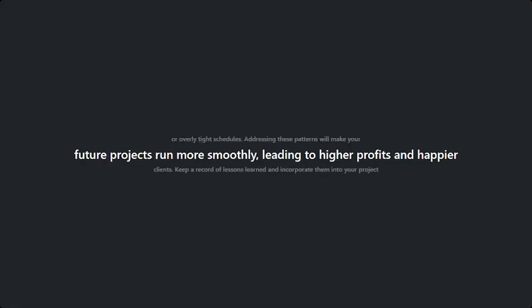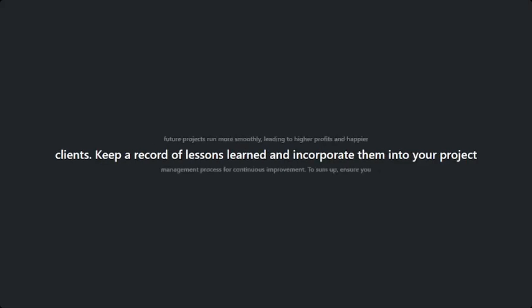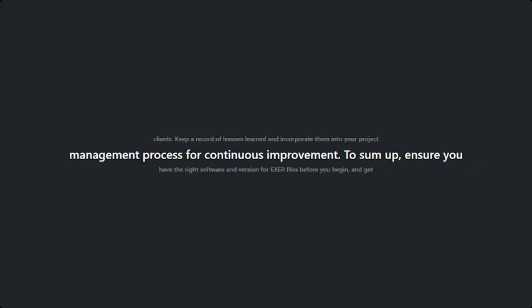How do you import an XER file? Open P6 Professional, go to the File menu, select Import, choose XER as the file type, browse to your file, and follow the prompts. Review any import options that appear.